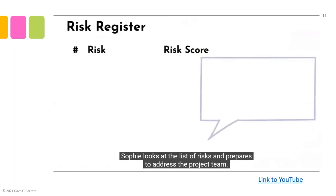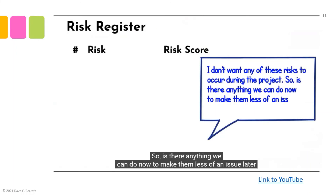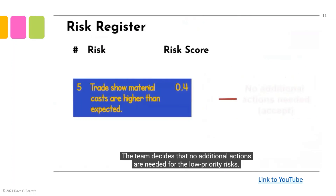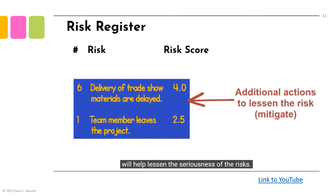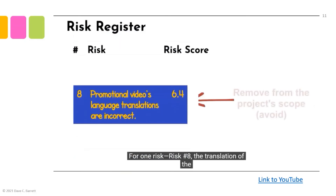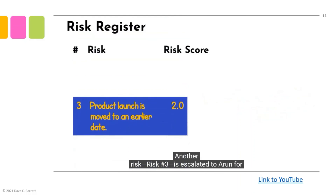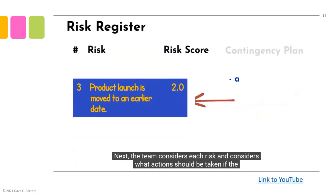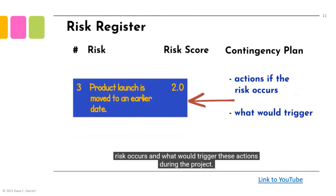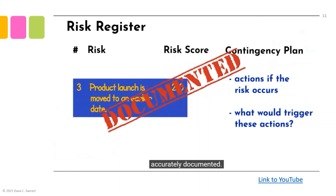Sophie looks at the list of risks and asks the team if there is anything they can do now to make the risks less of an issue later. The team decides no additional actions are needed for low priority risks. For others, they list additional actions to lessen the seriousness of each risk. For risk number eight — translation of the promotional video to other languages — they decide the risk is too high and recommend removing that requirement from the project scope. Risk number three is escalated for discussion with the senior management team. The team then considers what actions should be taken if each risk occurs and what would trigger those actions, with Sophie documenting everything accurately.